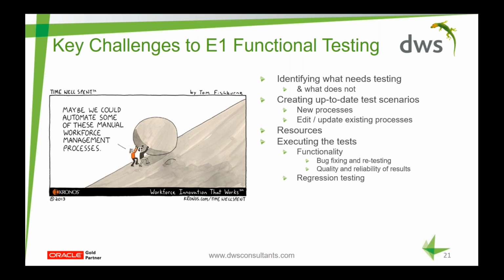When it comes to the execution of the tests, you need to focus your testing effort on the code that has been affected by the changes in the new ESUs, or even in the code that you've changed yourselves. You also need to consider how thoroughly you need to test each object. Is the change, for example, just the repositioning of a yes-no dialog box, in which case the testing required will be very simple? On the other hand, if the changes have a profound impact on a number of objects in a process, that process will require much more thorough testing. Again, the Dimension Focus tool we introduced you to earlier provides you with all the information that you need to help you plan your testing efforts.